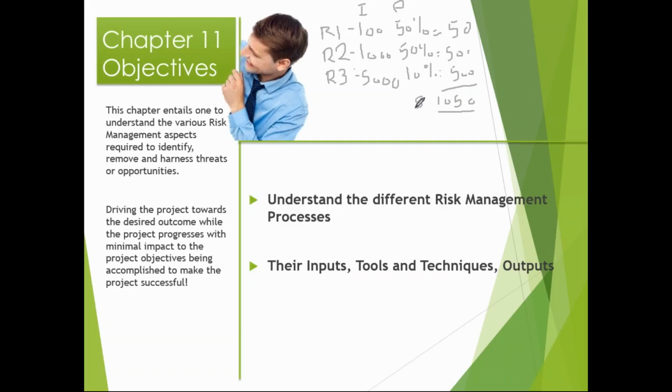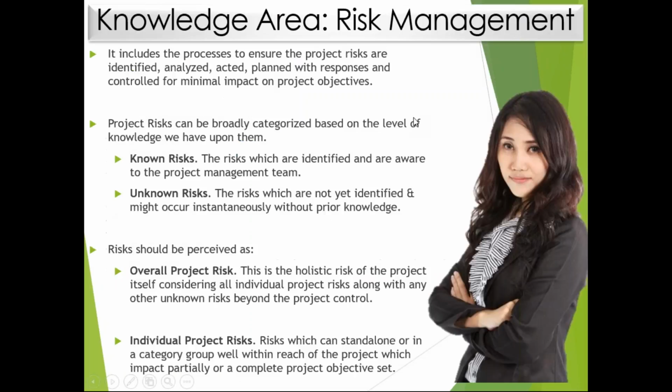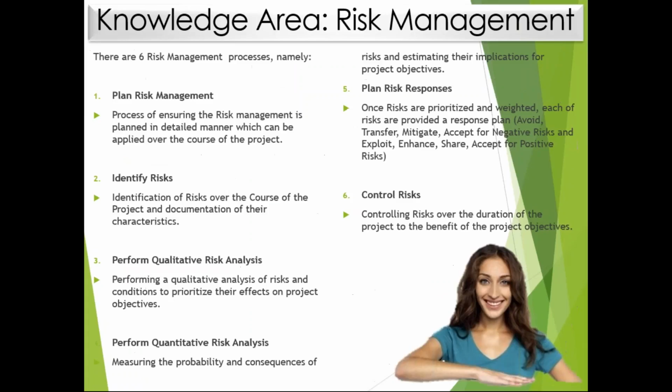Now, this is something which I've calculated in terms of dollars. You can go and calculate it in terms of days. The only thing which is going to be changing is the impact. Instead of dollars, it's going to change to days or weeks or whatever unit of measure that you're using for time. Okay. So that's your overall project risk and the individual project risks.